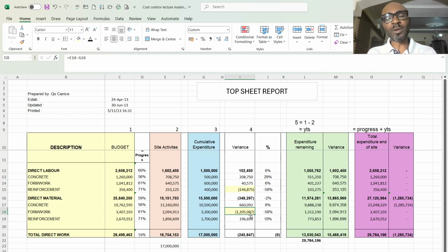If it is an outright loss as a result of negligence or waste, then you will put measures in place to curtail it. And if it is a loss as a result of fluctuation, because you bought marine plywood, instead of buying at 25,000 per piece, you bought at 30,000 per piece, and that is why you're having this cost.